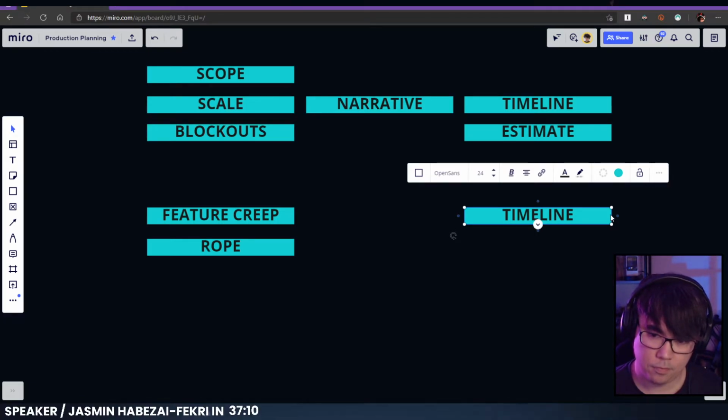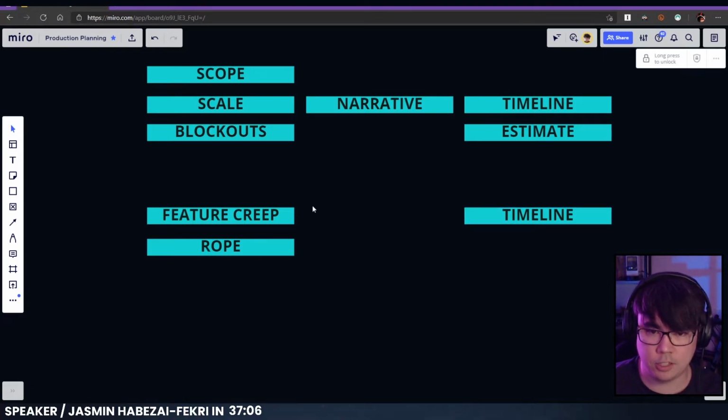Now, let's say the timeline's locked and features keep changing and adjusting. That can get kind of dicey when it comes to estimates. And that's how overtime can form. Cutting of content helps to negate a lot of that stress that can occur in the development of a project.